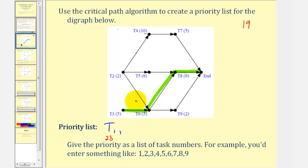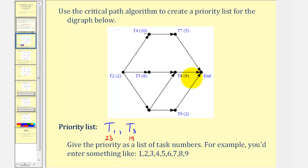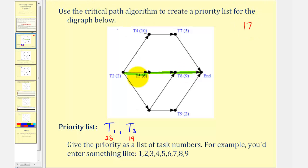So this is the new critical path, and we add task three to the priority list with a total time of nineteen hours. Now we eliminate task three from the digraph and find the critical path again. The critical path starts at task two — the path from task two to five to eight to the end has a total time of two plus six plus nine, or seventeen hours. There's no other path that would be longer, so we add task two to the priority list. Now we eliminate task two from the digraph.